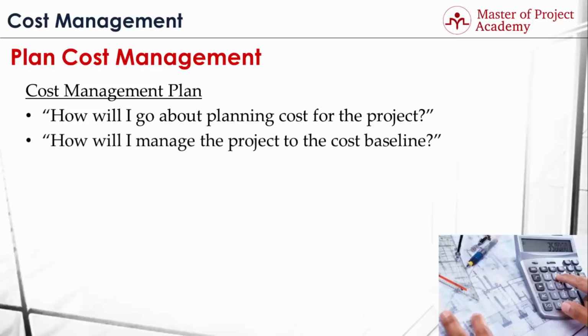And how will I manage the project to the cost baseline? After the budget of the project is determined, the cost baseline is taken. Cost baseline shows the initial cost estimate of the project, and if nothing changes in the project or if there won't be any approved change requests, it is expected that the determined project budget will be met. The cost management plan will guide you on when to spend on what throughout the project and ensure you meet the determined project budget. As many management plans, the cost management plan is also part of the project management plan, which helps to meet the project goals and objectives as a whole.